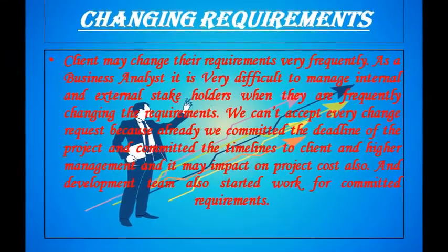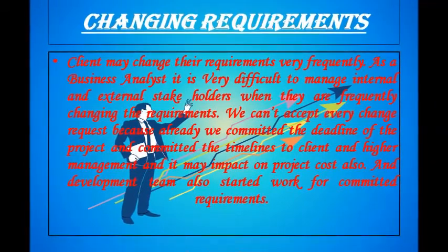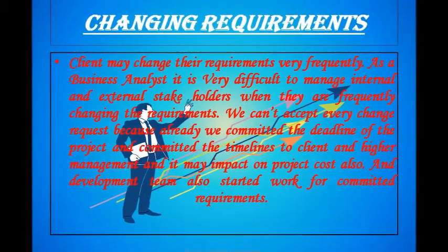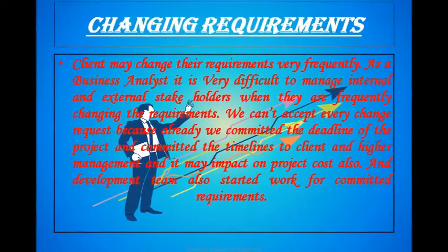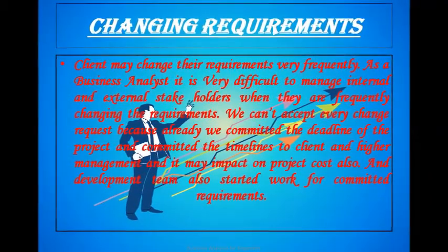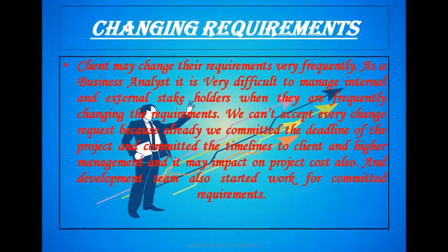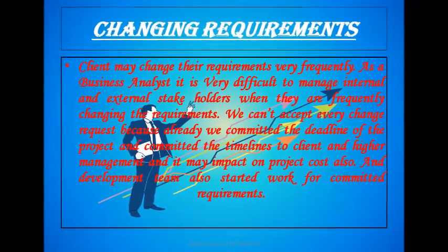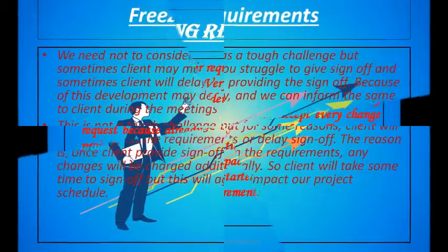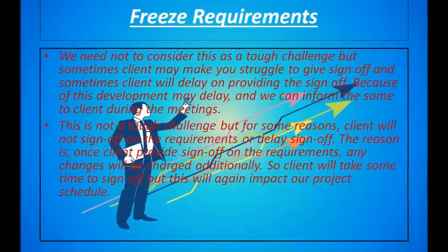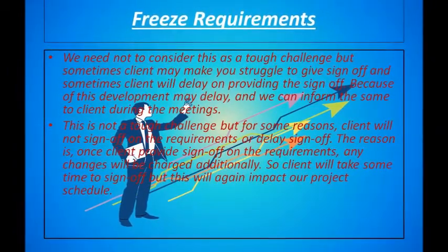And it will take a good amount of time to discuss and understand the requirements of the new change and the feasibility of the same. And we can't say no to the client because it may impact the project, so we need to convince the client with proper reasons. Before saying yes or no, as a business analyst, we need to analyze what is the impact of this change and how much effort is needed to deliver this change. Every client may not change their requirements frequently, but it may happen in general.